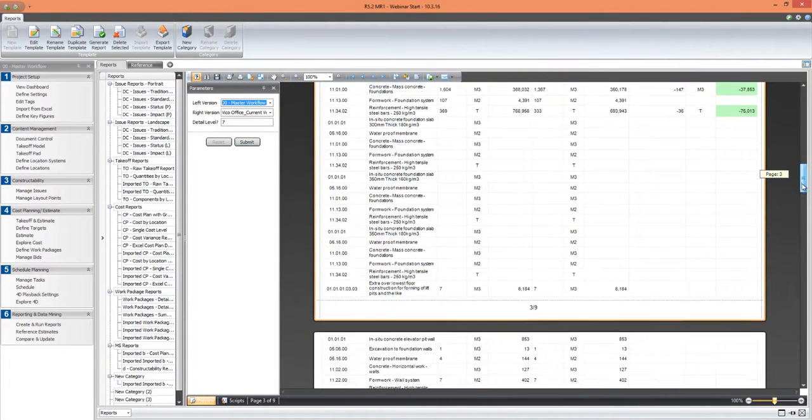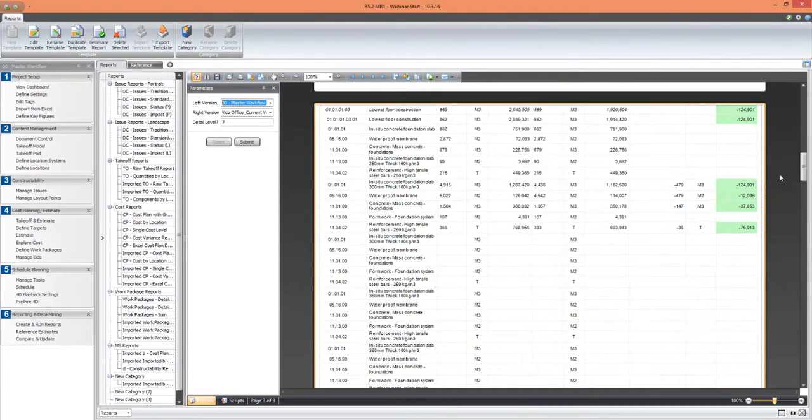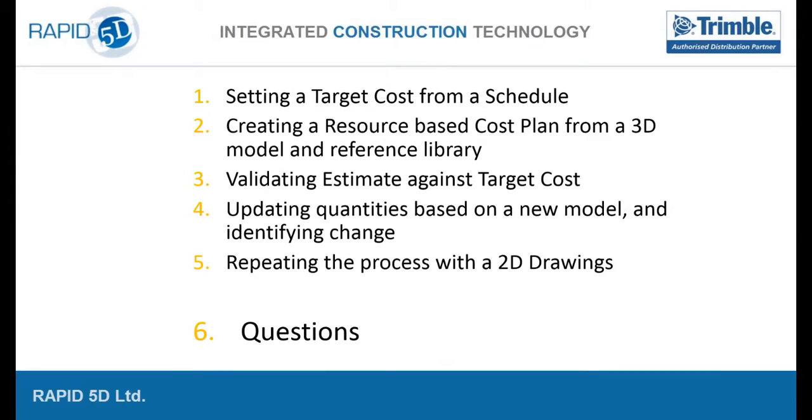straight away. So if we're looking at valuing change, if we're getting a variation order, we can go to the client and say, here was the change, here is a report that shows where the quantities changed and how that's impacted my cost. Obviously, we're fully aware that you may have to go in and still tweak it further based on this new information. But basically, that was it.